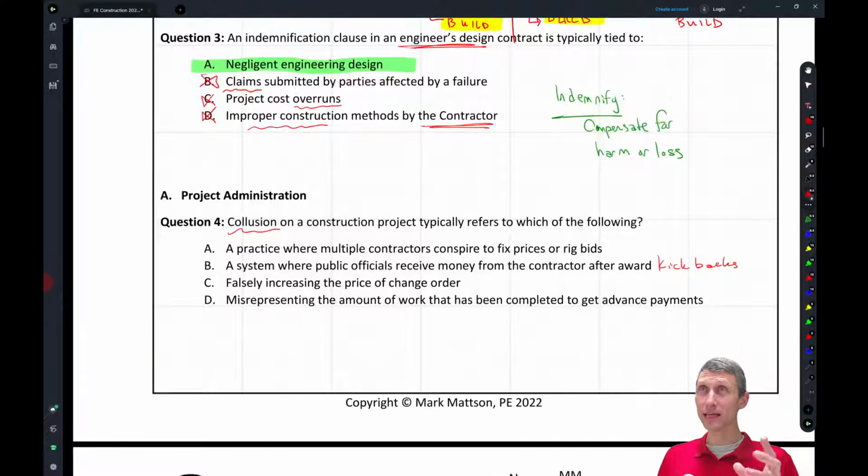I mean, 5 to 80 is just quite a lot, right? So we said, no, this is wrong. You maybe missed something, but maybe you should go talk to this other subcontractor who can do the work for you, because we talked to them, and $5,000 is probably more reasonable. And eventually the contractor we were working with came down. We were able to get an agreeable price and make it work.